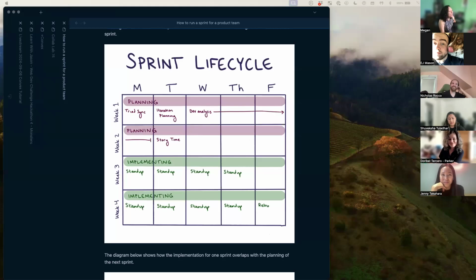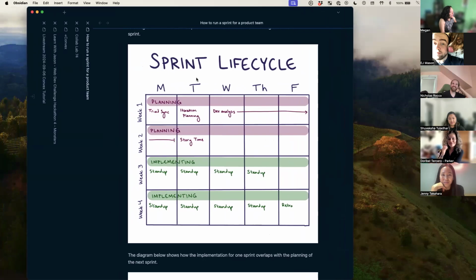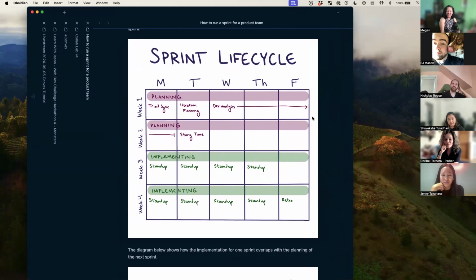I'm a visual learner. So this was what the sprint life cycle looked like at that first dev job, where they were very big on Agile. We worked in the implementation stage, and every sprint was 2 weeks, where every day you would have your stand-up meeting where you're talking about what you worked on so far. You look at what ticket you're assigned to and if you need to swap pairs or anything. And then at the end of that 2 weeks, you have your retro to look back and reflect on how it went and talk about that as a group.